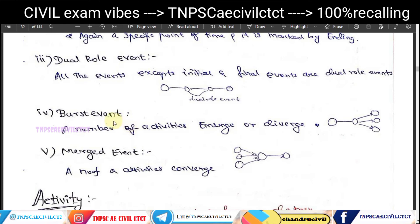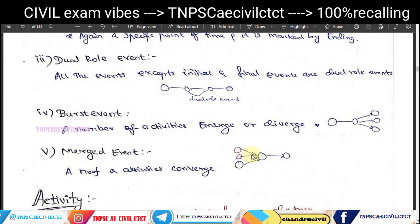The fourth type is the merge event, where multiple activities converge into a single event. The fifth type is the burst event, where one event diverges into multiple activities. These represent the convergence and divergence of activities in a network.